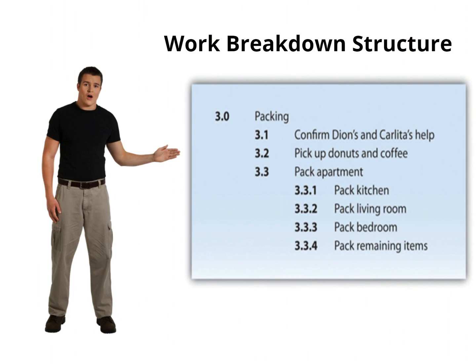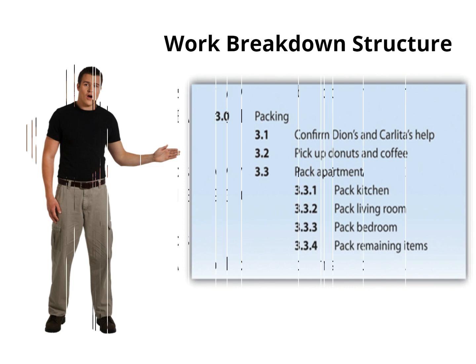The WBS is developed or decomposed to the level that the manager needs to control or manage the project. On our John's Move example, the project schedule may have been just as effective without detailing the packing of the individual rooms in the old apartment. If we deleted these items, would John know when he needed to pack each one of these rooms? If the answer is yes, then we may not need that level of detail.